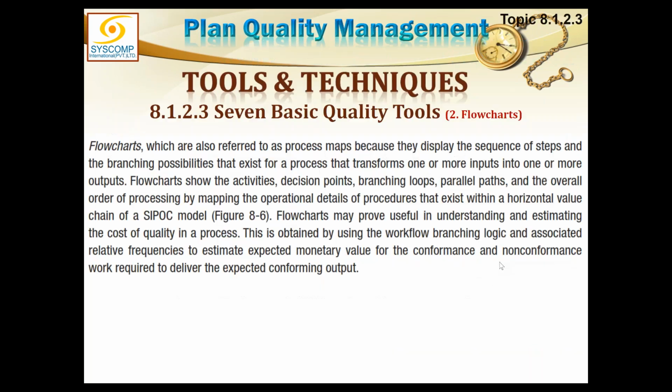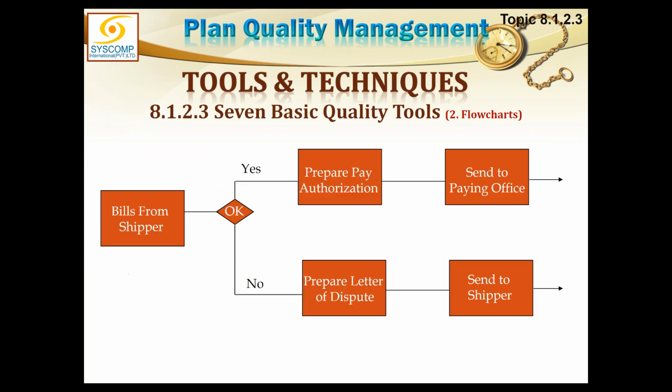So this is a very important tool for fixing the problems. Then we have the flow charts. If we have documented processes, we can see how things are happening in our organization, how this process is working. Okay, we'll do this and then this step and then this step, and you can track down on this flow chart and find out where the problem actually occurs, which is the bottleneck, and you can fix that.